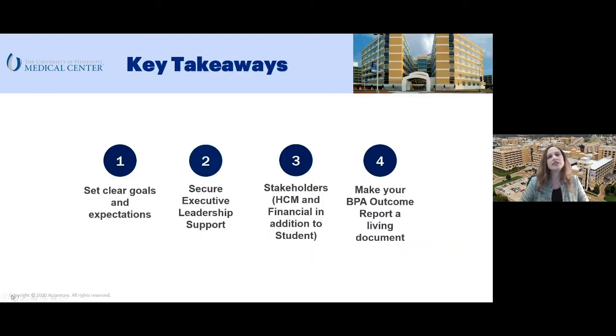So I'd like to leave you today with some recommendations and some key takeaways. First off, I'd recommend setting very clear expectations from the beginning. It's important to make sure your participants are aware of both what they should and should not expect from a BPA session. This was an opportunity to really dive into the details of our business processes and policies, but it wasn't intended to provide any Workday demos or serve as a training opportunity. This communication to our customers was really a valuable step that we were able to take to make sure that we had the right people in the room.